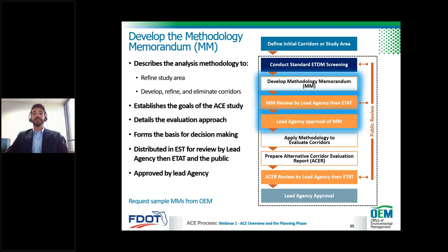It's critical to carefully select the analysis approach that seems to make sense for the project. This could be based on available data, known critical issues, feedback from the ETAT or other stakeholders, and the district's own knowledge of the area. The approach should describe the specific data used, such as GIS layers and analysis technique. The evaluation is similar to a PD&E study, but less detailed and at a conceptual stage.